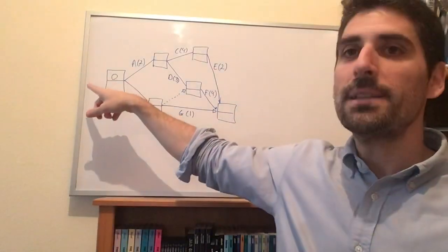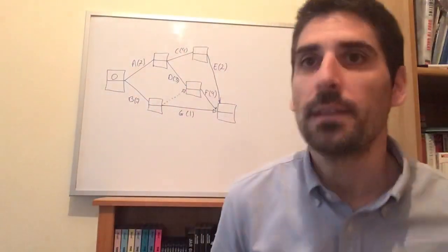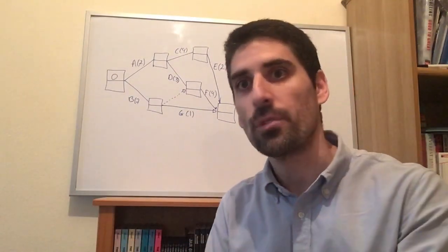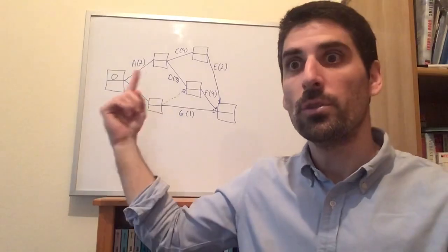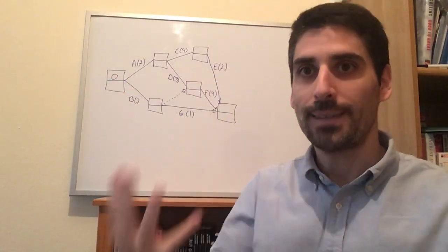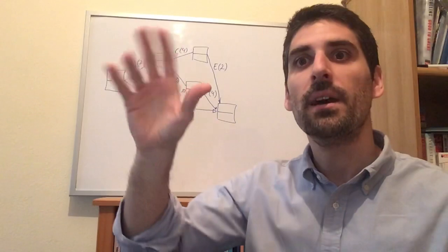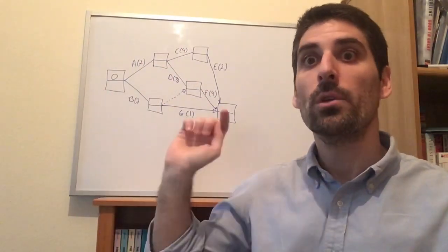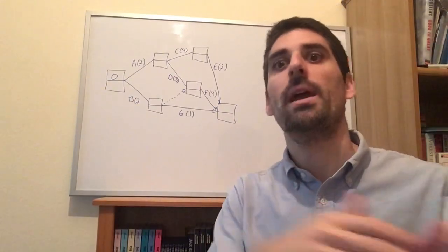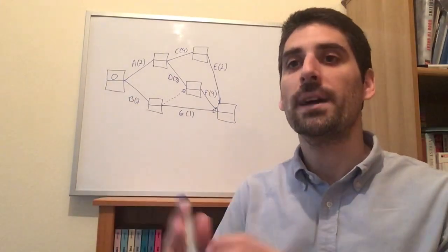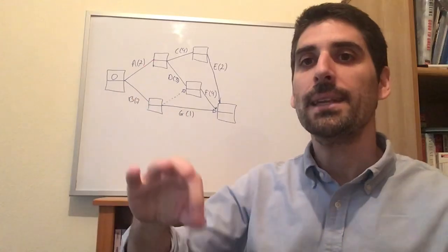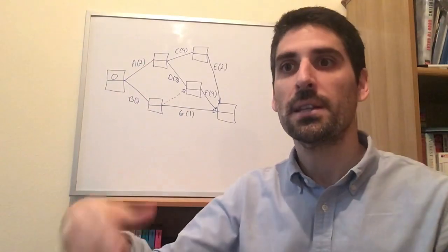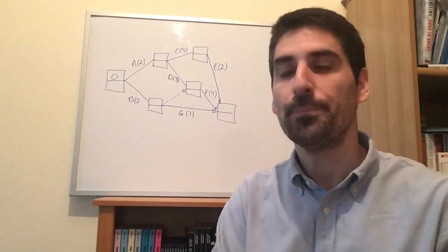We're going to complete first the early start time for every activity in what is called the forward pass. So we're going to go from left to right in the diagram, completing the early start time of each activity, and then we will go backwards, hence why it's called a backward pass, and we will do that to find out the late arrival time, or the latest we could start an activity without delaying the project.